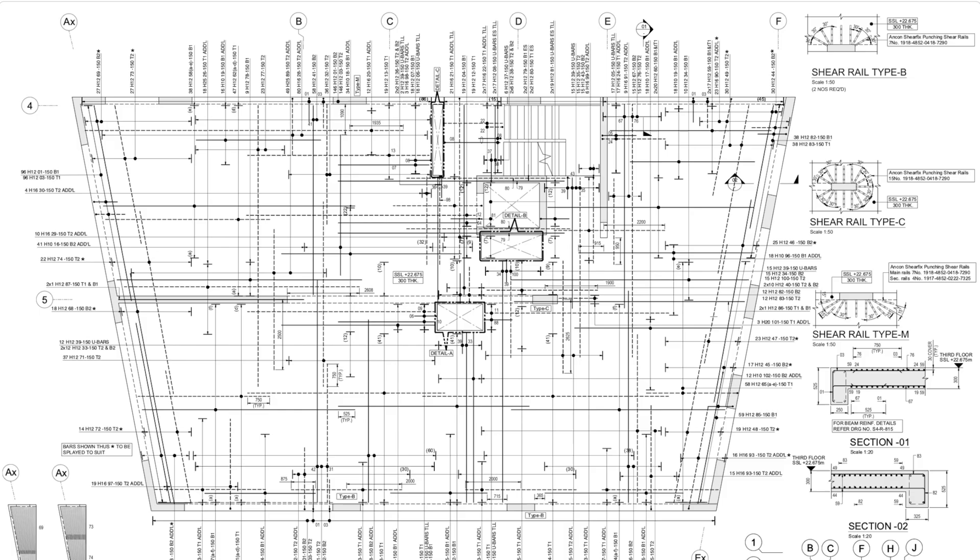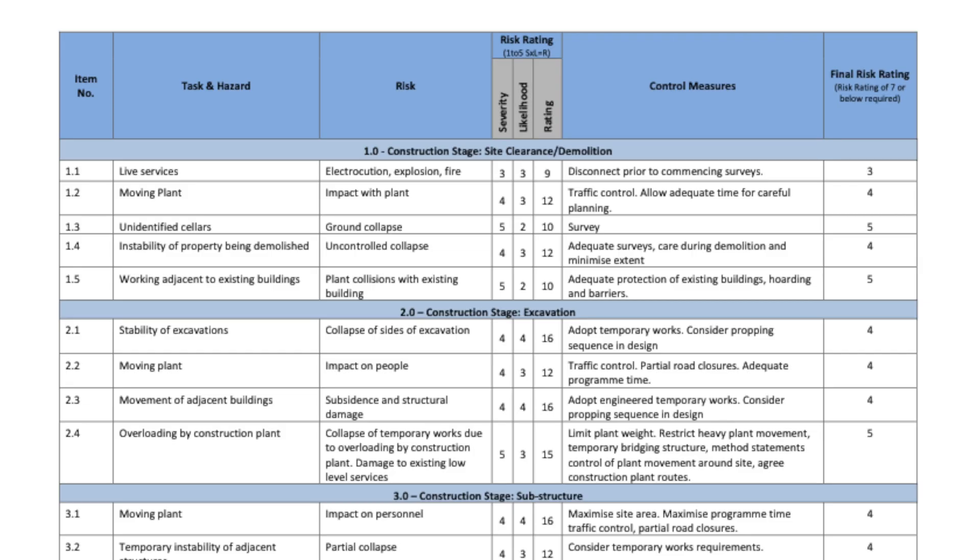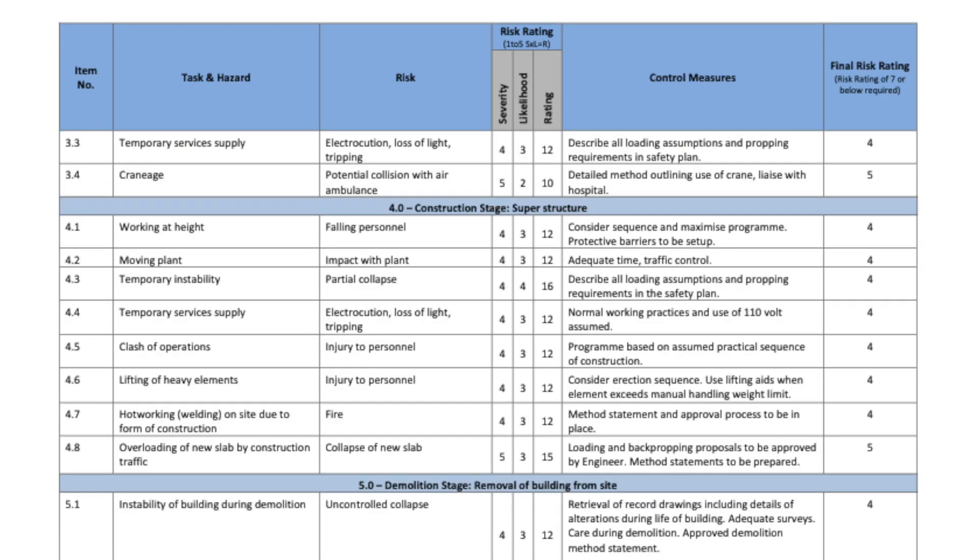If you've got a concrete frame, stage 4 is where you'll be producing reinforcement drawings and schedules, ready for contractors to order from. Again, you need to remember to update your basis of design report and highlight any residual risks you couldn't eliminate in your design. Alternatively, create a designer's risk assessment which highlights all the major risks that the contractor definitely needs to know when they go on site.